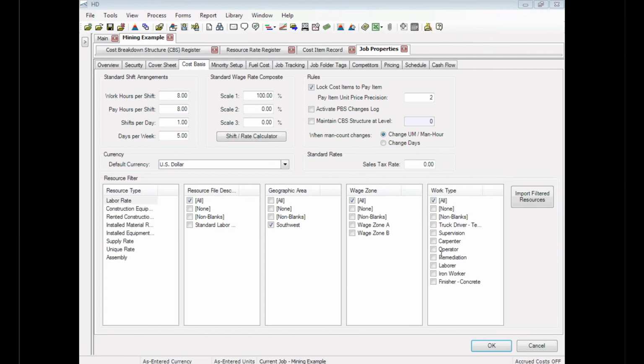Projected trend cost. What about if I need a projection? Is there any database with projected trend cost? That's probably, and Paul, you could correct me, but I think that's almost like a two-part question, because part of that is if the question is around current progress on projected trends, Hard Dollar has the ability to take the estimated original cost, and then based on our current actuals, forecast based on productivity averages against what we projected, as well as calculations on last entry for last week's entry for forecasted productivity, average productivity forecasted, and then perfect world productivity forecasted.